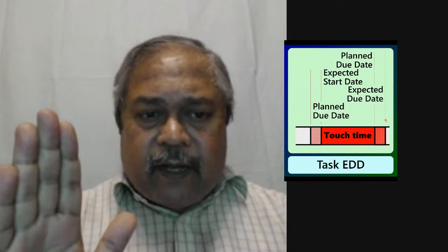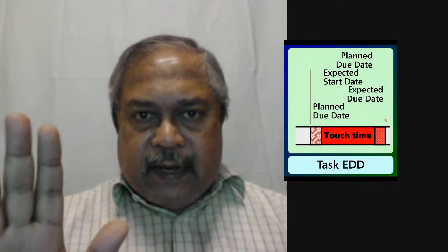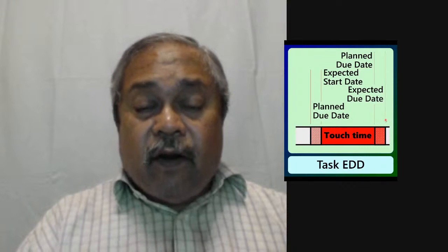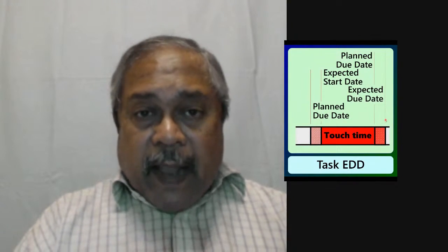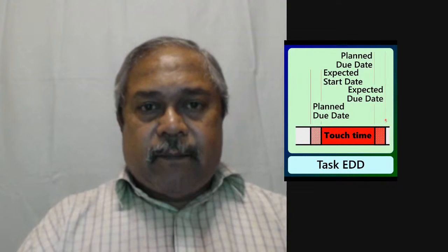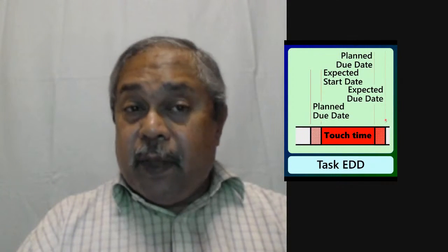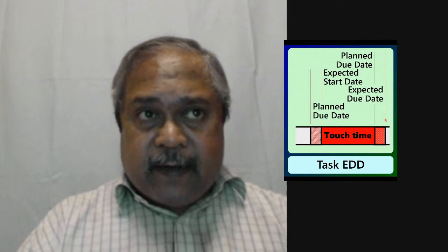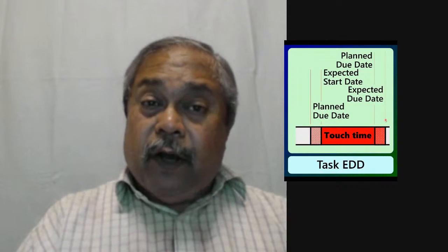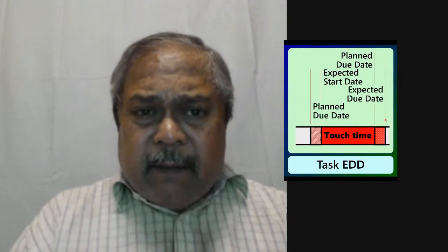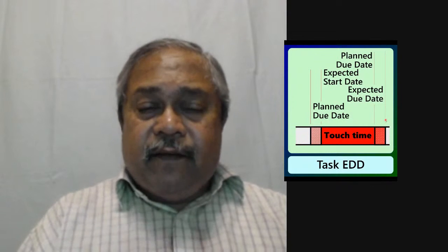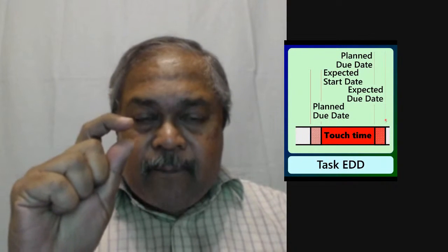This is required only when the task is delayed. When the tasks are all on time, then always plan the buffer at the end. There won't be any crisis, because the end buffer can be used up by everybody. In this case, where the task is really beyond the planned start date itself, beyond the original planned date, we have not even started the task. There, my recommendation is to plan a very minute micro buffer, and keep it transparent.